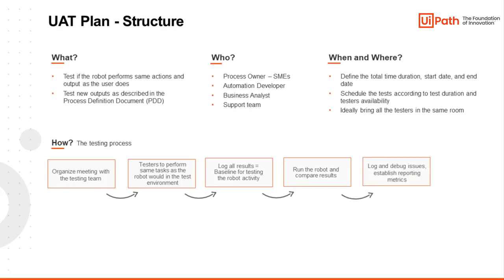If the testers identify any issues, every piece of information must be logged and described as early as possible. To facilitate debugging, a report that highlights the pass rate of the planned test cases must be compiled. The entire process must be repeated until the results of all the tests are in accordance with the expected result. If the testing procedures are not planned adequately, we might encounter multiple delays that prolong the automation process time.